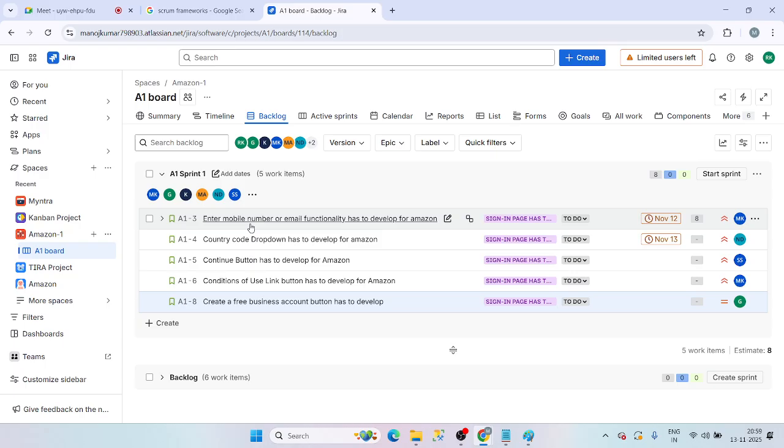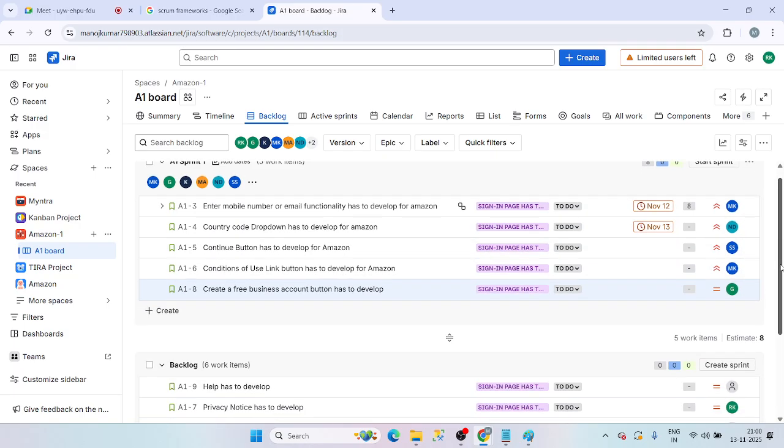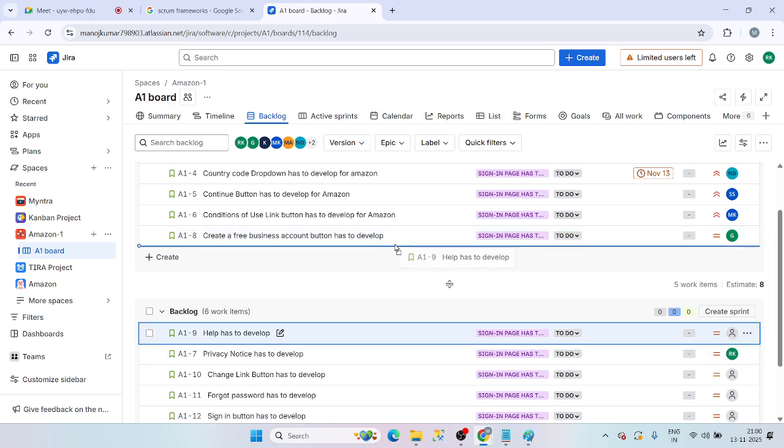Like that, everyone, the leads will be there. The dev lead will give the time. Based upon time, we calculate 1000 hours. Now we have calculated 5 tickets. Manoj, got it? 5 tickets calculated, and we are full with our capacity. There is no bandwidth, no backup time. What will we do? We will remove all the remaining tickets.